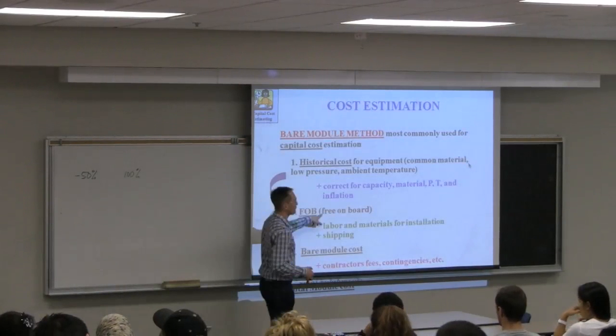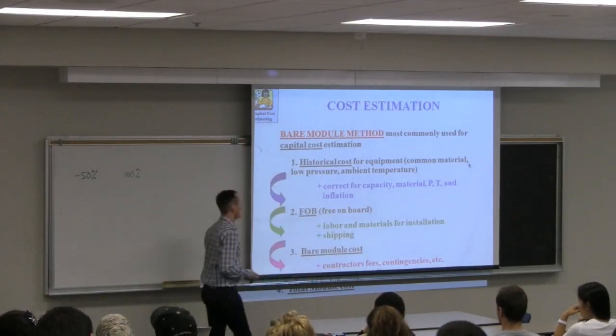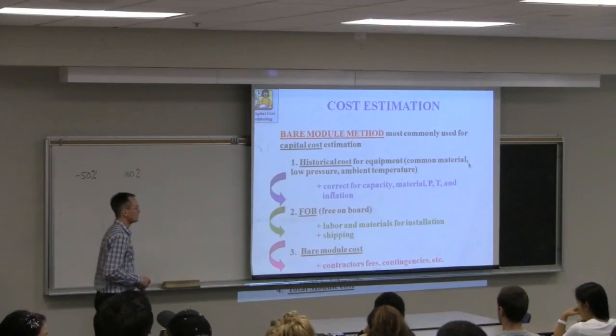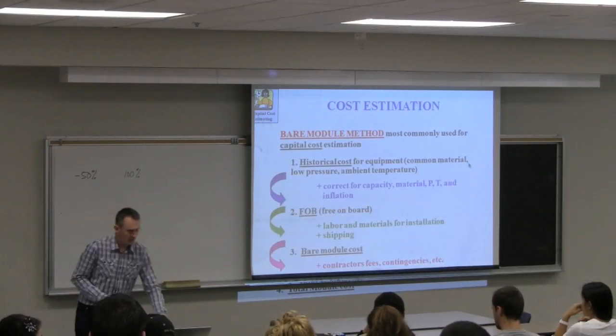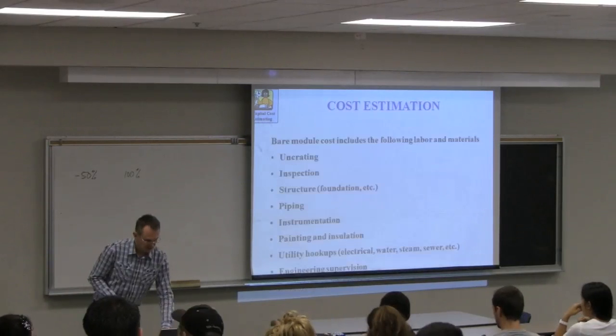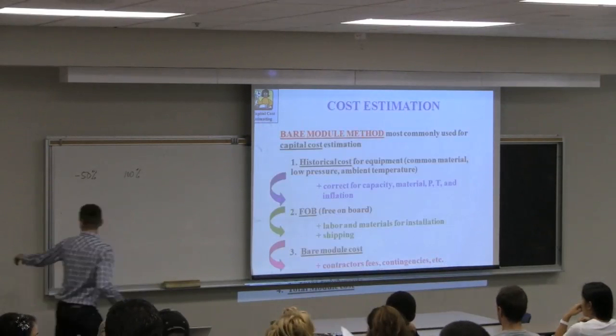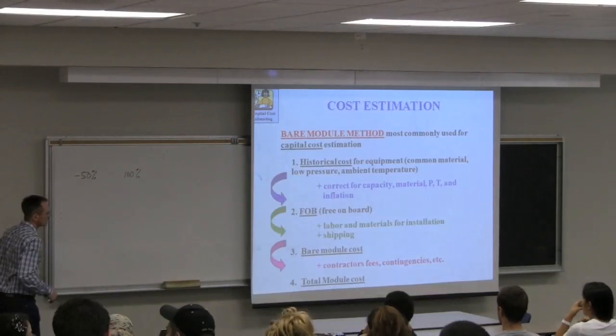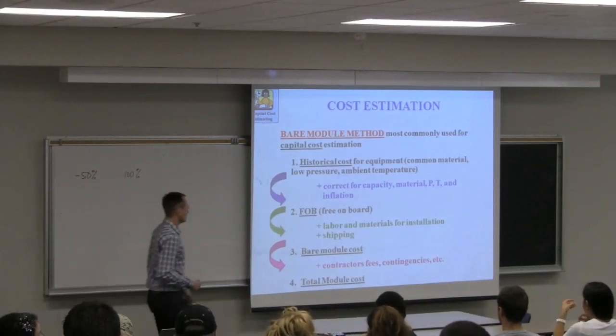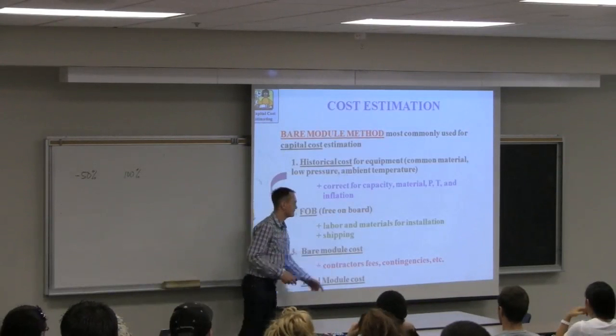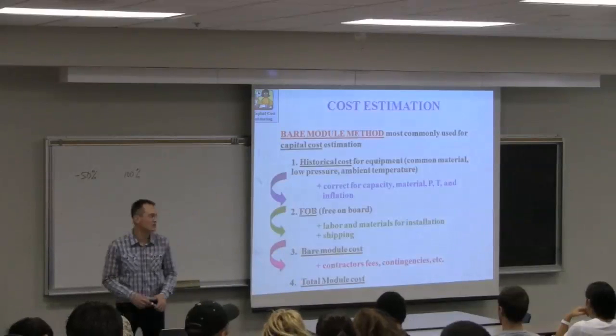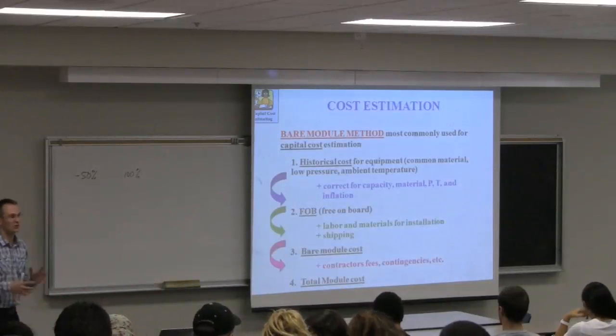Then we add in what's called free on board. I'll explain that term now in a minute. Labor, materials for installation, and shipping. And then we'll update that FOB cost and get a bare module cost, which includes the fees for contractors and contingencies. And then we'll get the total module cost.